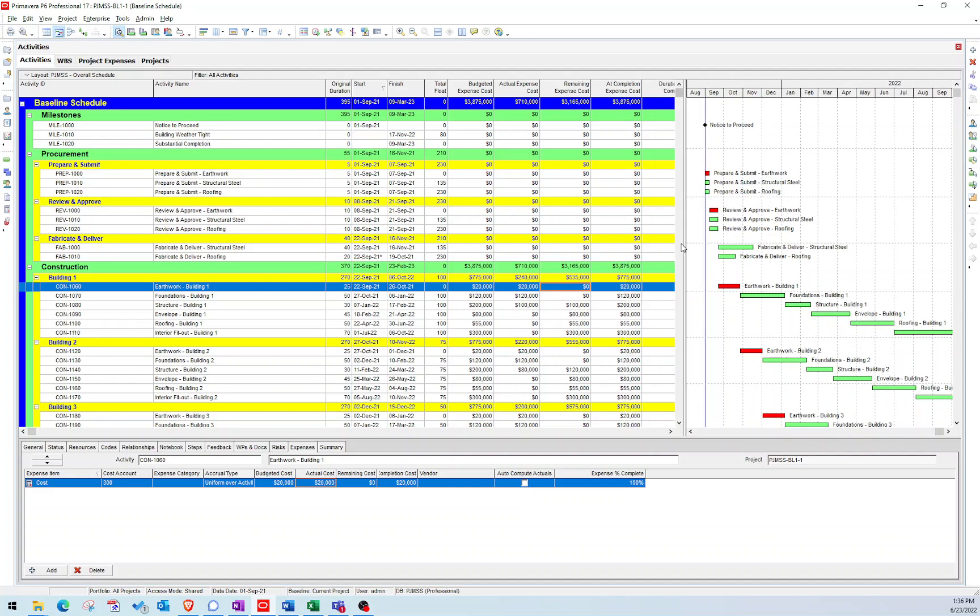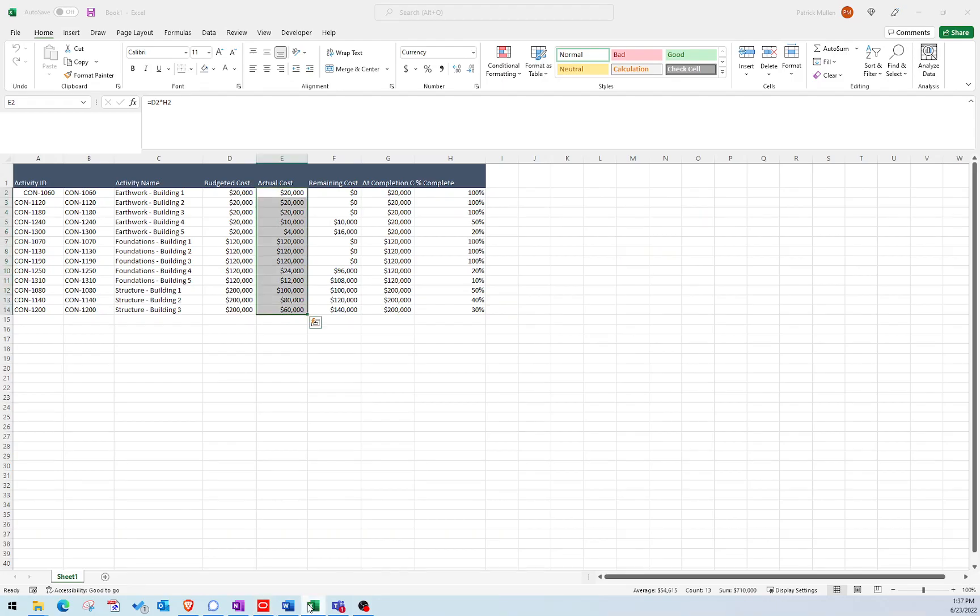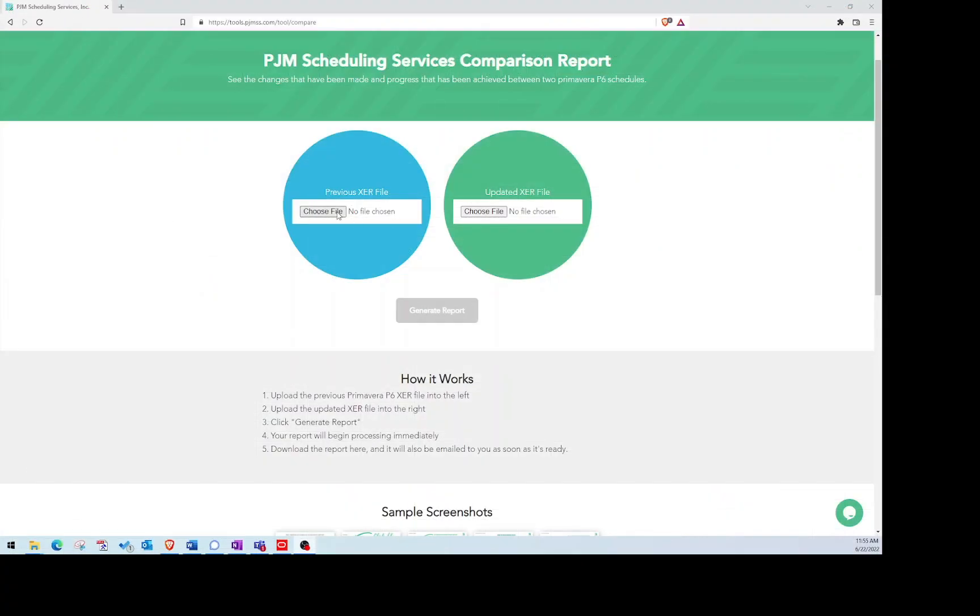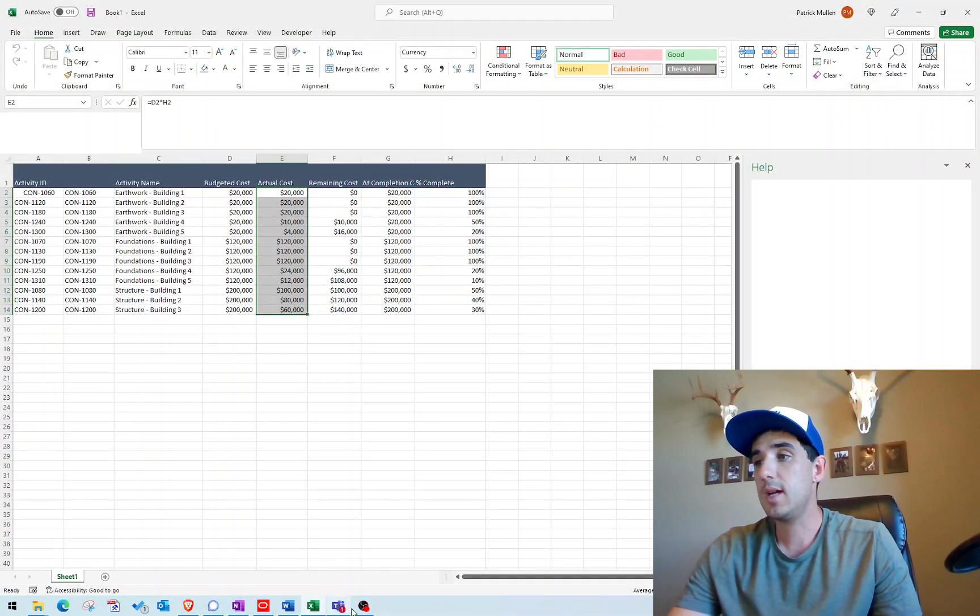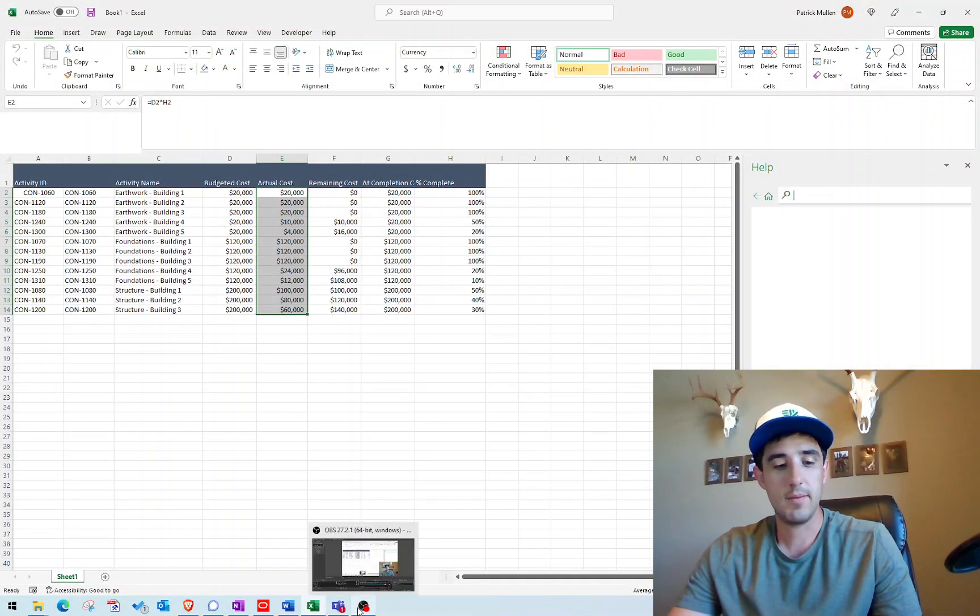Don't forget you need to physically add progress to your activities. But if you're working off of a pay app and you're just wanting to match the values in the pay app and you have the activity IDs in the pay app like we did over here, then that's how you would import those actual costs into your schedule file to make sure that they match. Yeah, I hope that helps. And we'll see you in the video next time. All right, take care. Bye.